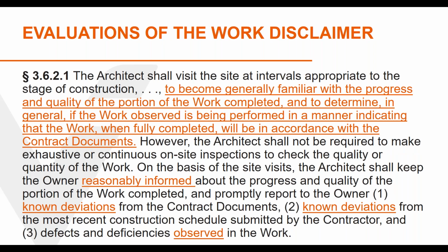What you do on a construction site is important to your client, but how you state what you do will be critical in protecting your firm. In the 1960s, the architect's contractual commitment was to supervise the work of the contractor. That was changed, and Vic Schinner had a role in that change because supervision was never what an architect did. So observe was used and then later changed to evaluate. In 1996, the AIA actually considered going back to supervision as part of a marketing effort, but case law showed the problem. So evaluate was put into the contract.